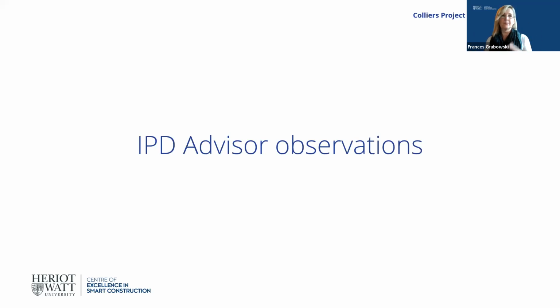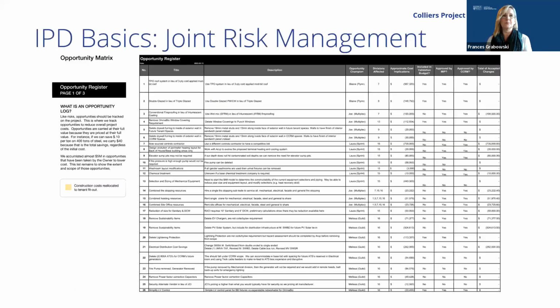And I think everyone is saying, and Stuart mentioned a few times, my being at the table, or having an owner rep at the table so that you're there every single day, is critically important in managing that budget. I think just one little bit to add to that as well, Francis, is that the whole budget is an open book process. Francis sees everything from the beginning as prices come in, and we work together to manage that budget. That's what is critically different from the traditional method to this IPD: it's all open book.